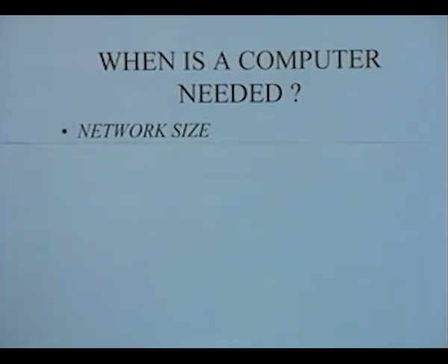So obviously if it's a small network of only 10 or 20 jobs, it may not be worthwhile to think in terms of putting the whole data on a computer. So depending upon the nature of your project, the size of the project, you can easily determine whether a computer is needed. But for practical size projects which involve more than 100 or 150 activities, it is helpful to have a computer which would be able to do all the computations and all the reporting for that particular project.